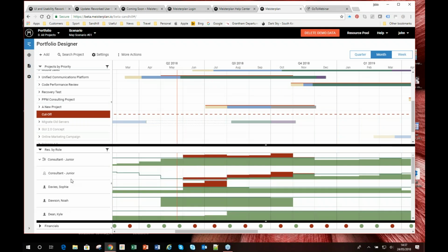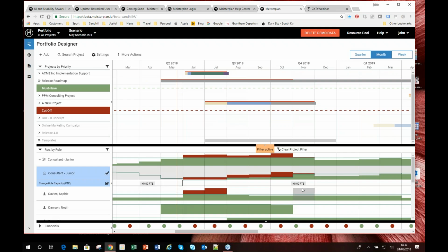If I open them up, click on my white line down here, and say what would happen if I brought in an FTE, a contractor, for a period of time, and I brought in a body to help me. Well, actually, that looks to have taken out quite a lot. What would happen if I could bring in 1.5 people, say? And that almost wipes out my overage. I may need to do some juggling down here, but actually that's not so bad.